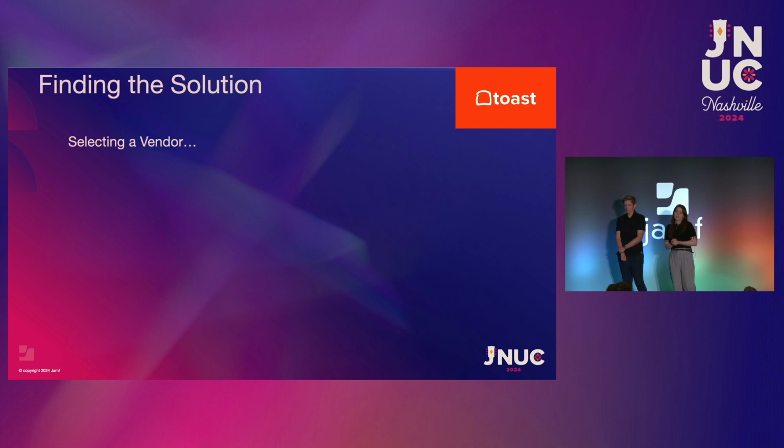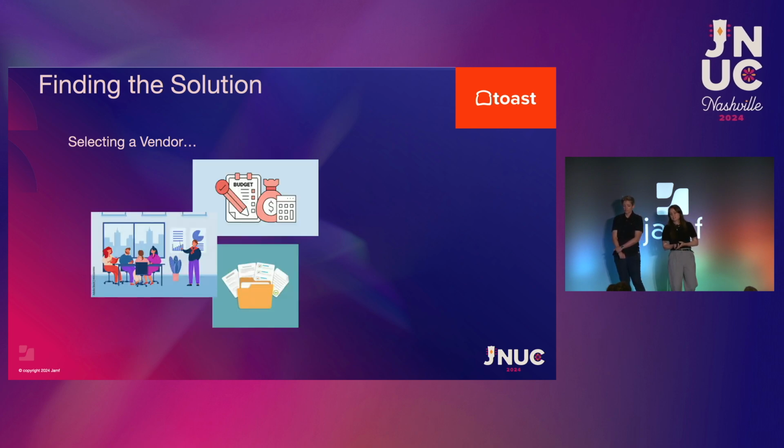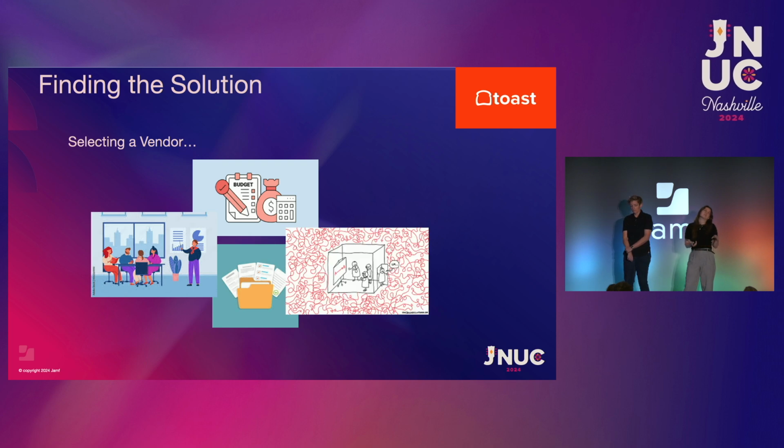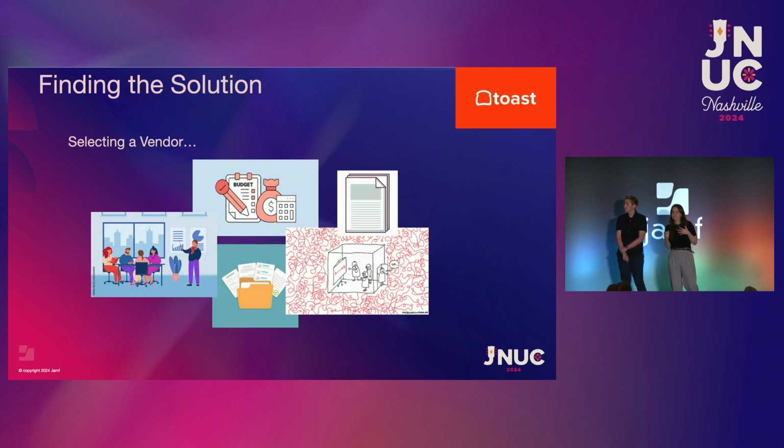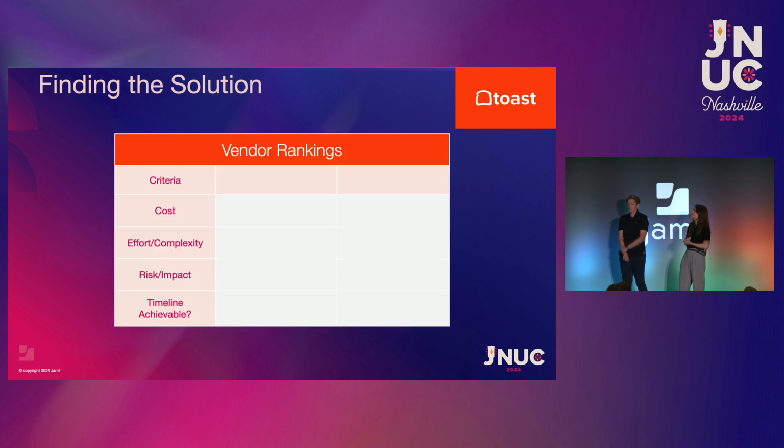So once we had our criteria, we started looking at vendors. We had demos, budget discussions, submitted ratings and comparisons, discussed complexity and IT systems impacts and impact to our global support teams, submitted more proposals, and finally we had 2 vendors that we ranked against each other. We will call them Tool A and Tool B.